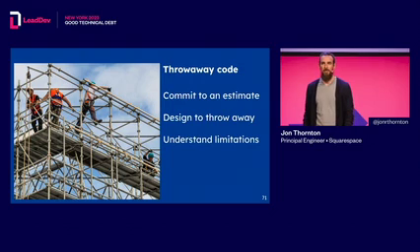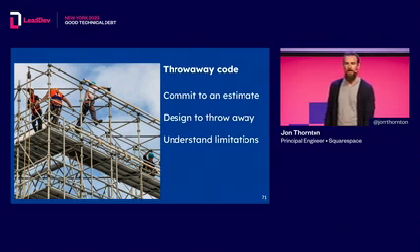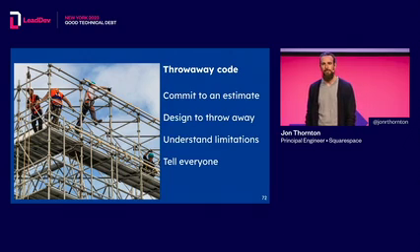We understood the scaffolding's limitations and avoided using it in situations where failure would cause harm. We'd be going deeper into debt if the team had to spend time cleaning up errors or investigating incidents. So we thought about all the things that could go wrong, and we made a list of supported use cases that we shared with our test users.